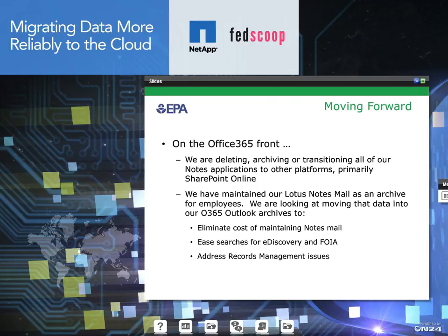Right now we have a significant investment in Lotus Notes applications. So we're looking at deleting, archiving, and or transitioning those onto other platforms. We have about 25,000 applications out there. We expect in our process that 80% of those will either be deleted or archived, and about the other roughly 3,000 to 4,000 we're looking at consolidating to make sure we don't have duplicative applications for our different bureau offices and streamlining them. And in the end, probably about 2,000 applications will then be redesigned and re-implemented on other platforms, primarily SharePoint Online, but potentially other platforms as well.